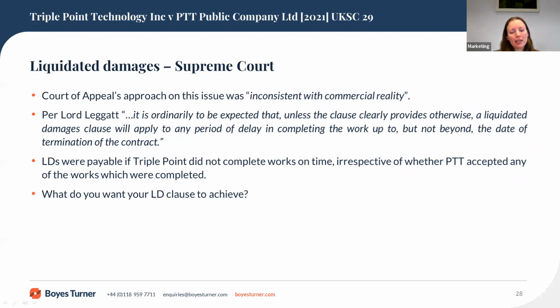So the key point from this case may sound obvious, but it's to think carefully about what you want your liquidated damages clause to achieve if there is likely to be delay. If you want the position to be something other than the orthodox approach set out by the Supreme Court, i.e. you want your liquidated damages to fall away altogether in the event of there being termination before completion, or if you want liquidated damages to continue all the way up until completion by another contractor, then you need to word your clause very clearly and very carefully.